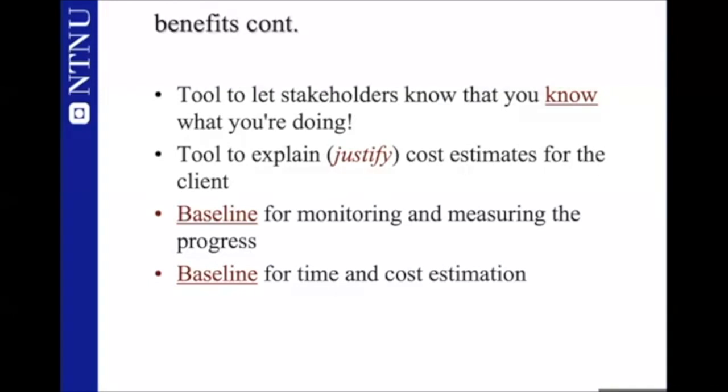And then they use the same work breakdown structure to monitor the project, to measure the progress. Did we finish this component? How much is left? How much time do we need to complete it? And as you can see, they use it as a baseline for the entire cost estimation process, as well as for time.